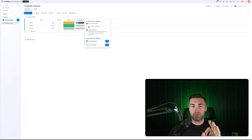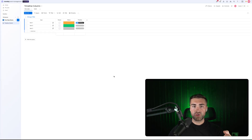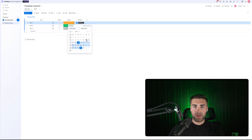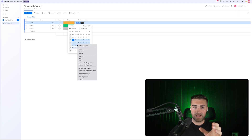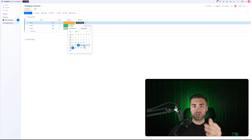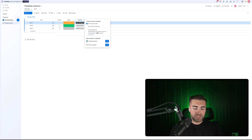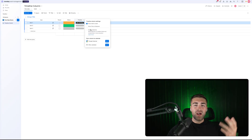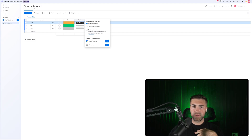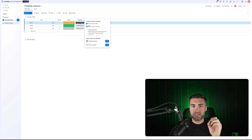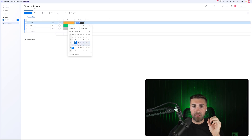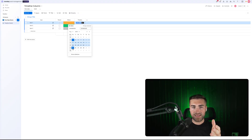In Settings, you can also set the timeline column as a milestone, and enable or disable weekends. If you don't want weekends visible in your view, they'll be grayed out and the day count will reflect accordingly. Under Customize, you can allow selection of weekend days and include them in item duration — for most people, you'd probably have weekends disabled.